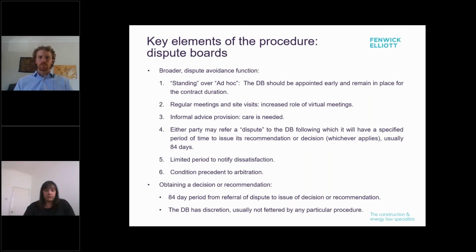However, the problem with ad hoc dispute boards is that they frequently do not serve the intended purpose of fast, informed assistance. The main issue, and this is something that Sana and I have both dealt with many times, is that if you wait until the dispute has arisen to set up the DB and one party does not cooperate, it can significantly delay a party being able to refer the dispute, which will then be decided by people with no prior knowledge of the project anyway. In that scenario, a party will often be better served without a DB procedure and proceeding directly to arbitration.